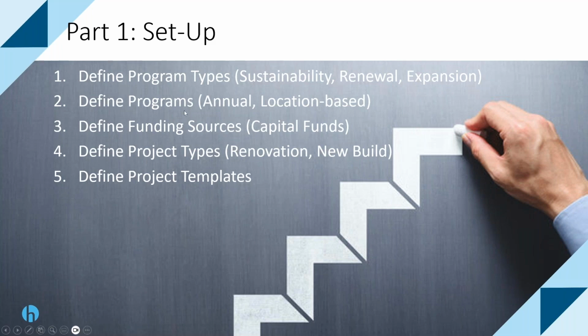These are more kind of specific, as we said, the smart meters initiatives, or your IFMS initiative, the smart parking initiatives. These are all going to be programs that have kind of a start and end date, and then multiple sub-projects below them. And these are typically kind of annually identified with a time frame and maybe even a location-based initiative. So programs are what you kind of use to collect and report on projects and also allocate funding to projects.